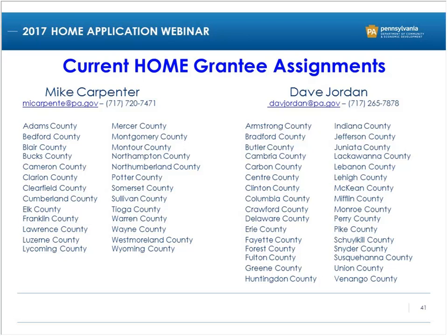Is there a tentative award date for DCED HOME funds? That will all depend on the publication date of the application kit. So I would say generally if our schedule holds true of November 22nd for publication and deadline receipt of January 22nd, it's generally 2 to 3 months until we can get contracts out. So you're probably looking at early to mid-April. That's tentative, and again, that's all subject to when we actually get the HOME application kit published.